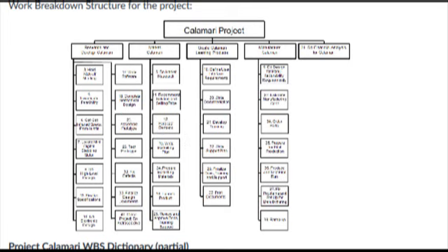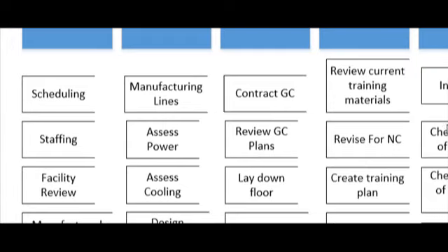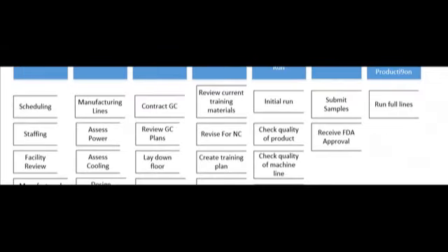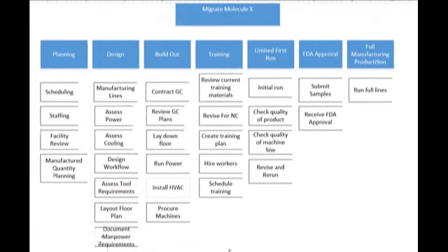If you think back to my project proposal that I demonstrated, here is an example of the graphical WBS for my project. Now, the WBS can be built a couple of different ways. I chose to build this based upon the project approach, the phases of the project, that's the blue boxes here, and the individual deliverables within each of these phases.